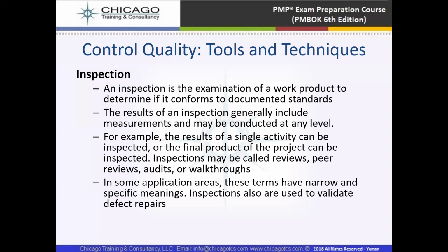An audit is also like an inspection, but an audit refers to a certain stage. If we achieve 30% of the project, we may have a first audit, and if we achieve 60% progress, we may have a second audit. So there are specific boundary parameters for how we are going to conduct an audit.